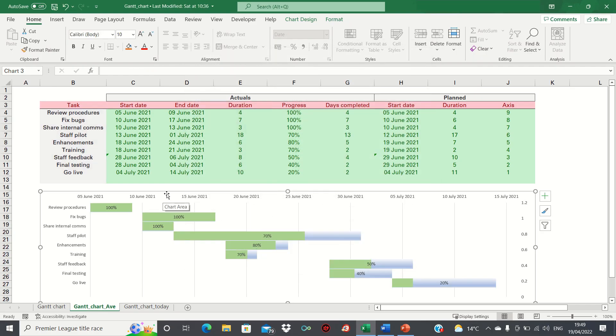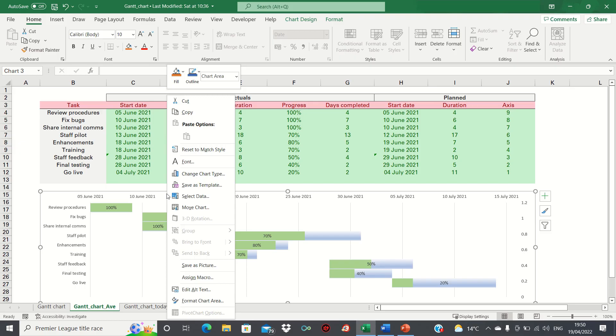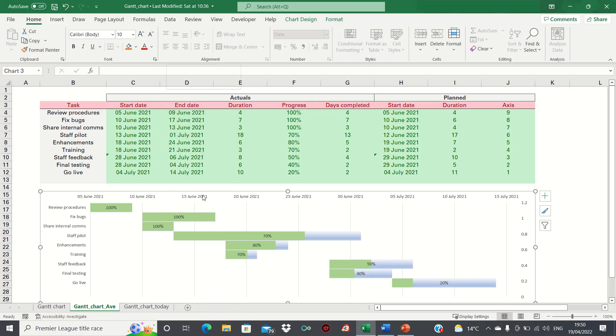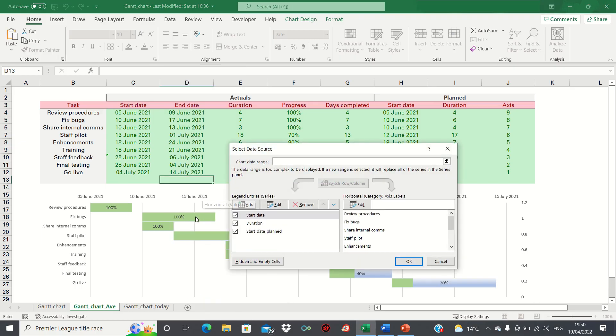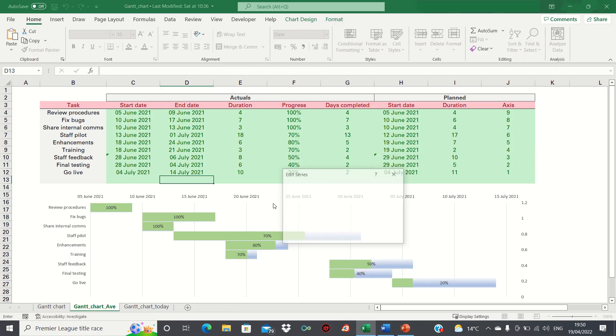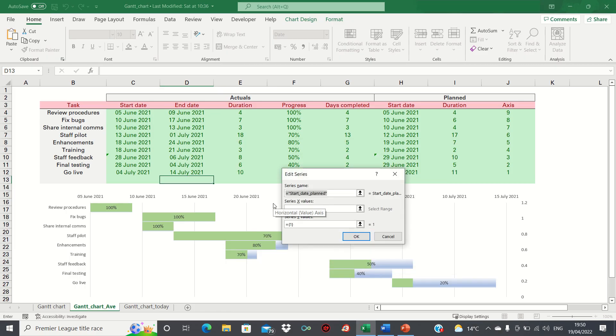Now we can apply the axis coordinates by right clicking the charts, clicking select data and then clicking edit. For the X axis we're going to use the start dates and for the Y axis we're going to use our axis labels.